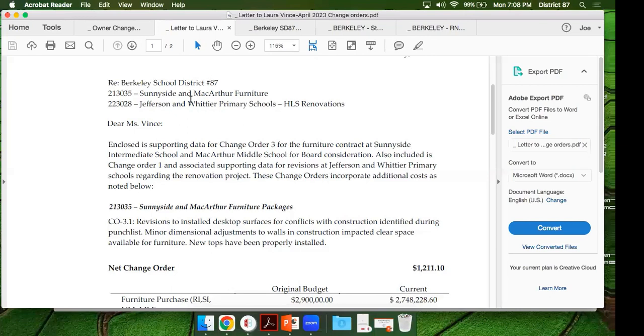So the next change order I have for you is change order 145 related to PR 63, and this is adding a doorbell for the kitchen at the receiving dock area, so that as drivers deliveries come in, they can hit the door, hit the bell, and the kitchen staff will hear the chime. So the cost there is $2,507.